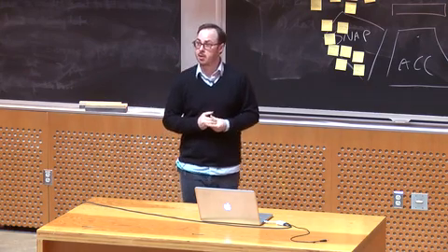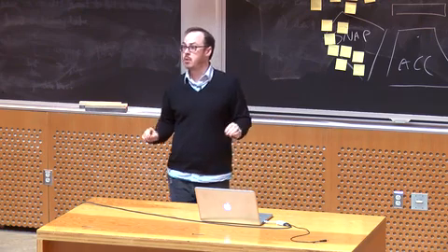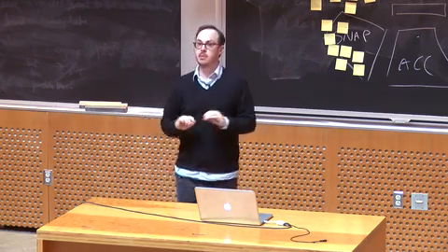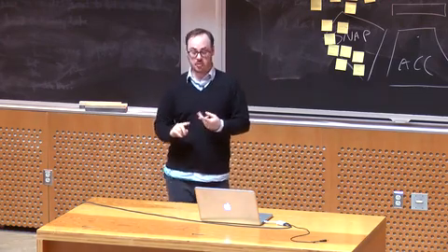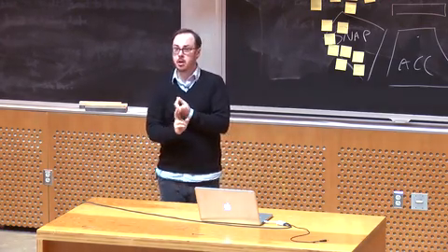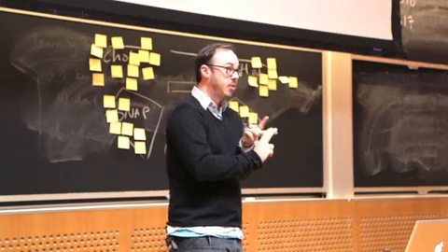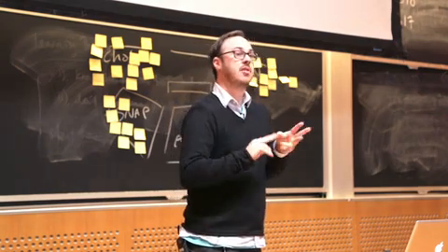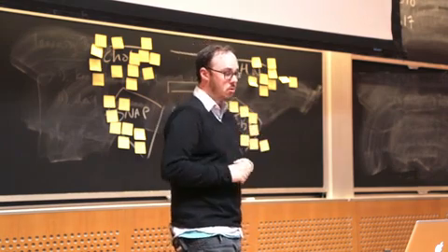We are asking for product backlogs. That's actually a concrete, please give us a product backlog. The format used for the product backlog doesn't matter to us, if it's a feature list, if it's a list of user stories. What matters is that all of the features that you think are going to be in the game are listed. All the features that are done are listed as done. And you've done some kind of estimation on what size those features are.